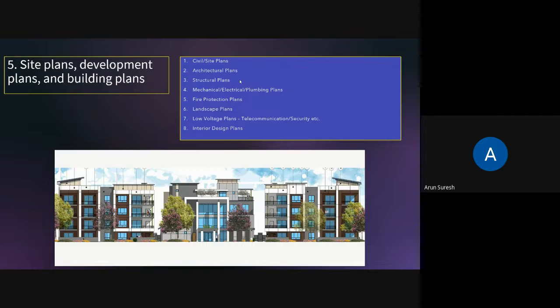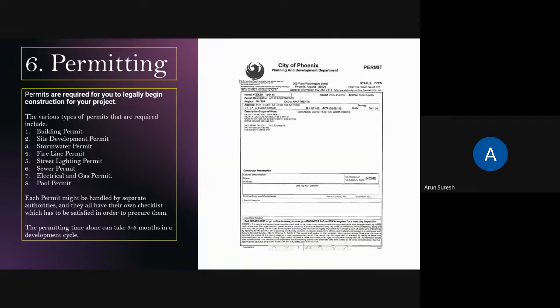This design phase usually takes somewhere between six to eight months in a total development cycle. Once the design is done, we take it and apply for permitting. Various types of permitting are required to build a building — a building permit, a site development permit, a stormwater permit, and a fire line permit. All these different permits are needed in order for your contractor to get started.